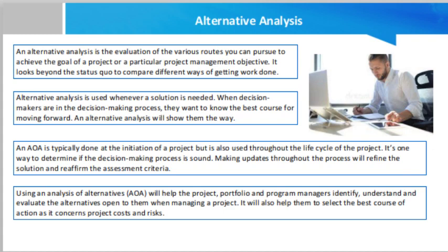So first of all, make a plan. That means the first thing to do is to make a plan. This means defining the various decisions that you can make to meet your objective and achieve operational effectiveness. You will want to include stakeholders but also define the timing, effort, or cost involved. There will need to be a study team assembled and a study plan to direct their activities.